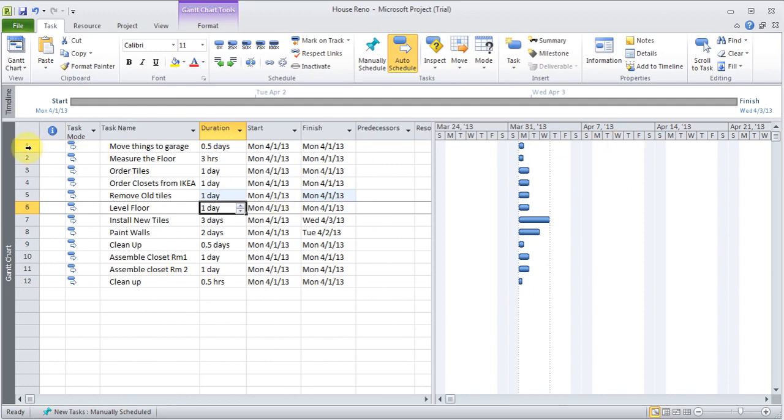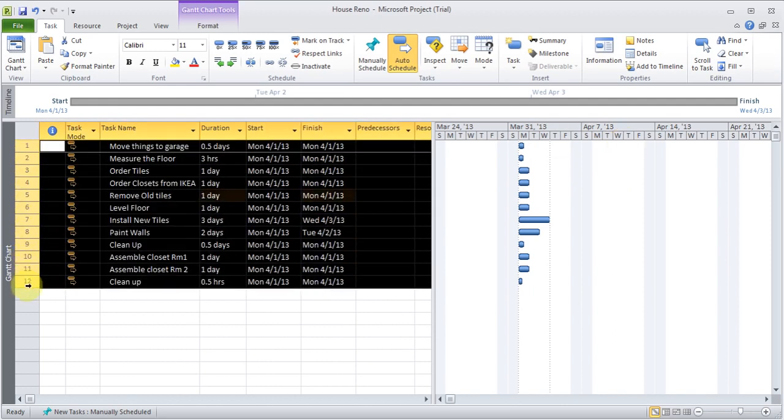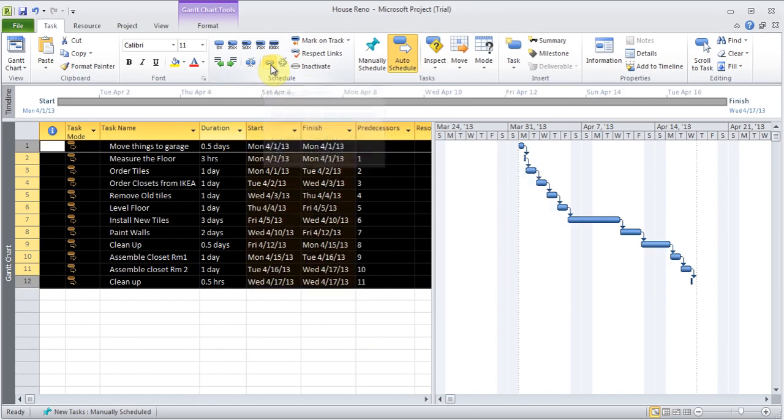So I'm just going to highlight all of these jobs, go to the corner, highlight, and I'm going to link them. As soon as I link them, you see how it changed. Now the job's ending somewhere in April 15th or things like that, because it's saying finish the previous job and then you can start the new job. So they use the word predecessor, which is the previous job, and successor is the one afterwards. So that's the wording they use.